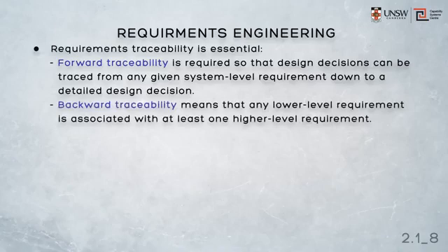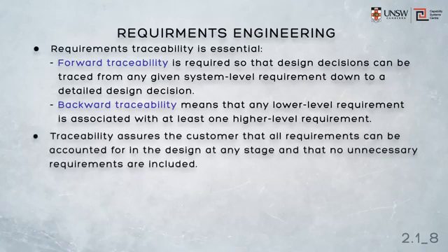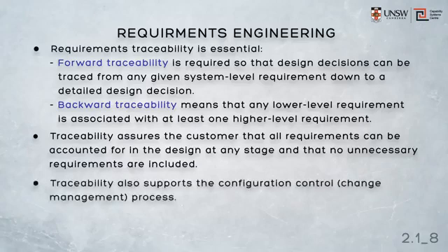Now, this traceability is important since the customer has to be assured that all of their requirements can be traced forward into the design. And further, any part of the design that can't be traced back to a high-level requirement is probably unnecessary work, something for which the customer isn't prepared to pay. Traceability also supports configuration control. If we need to change a requirement for any reason, we can see where that requirement came from and what's the impact of the change.